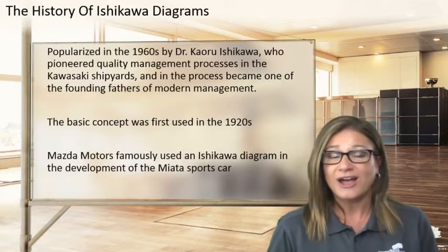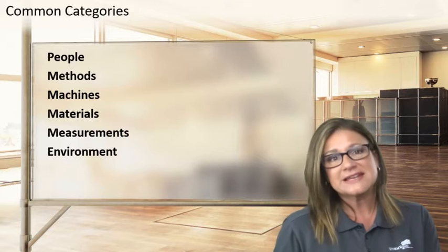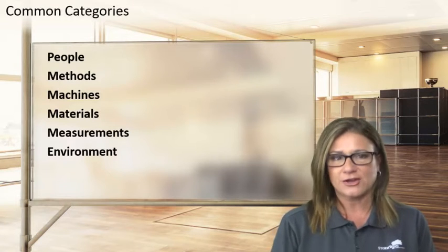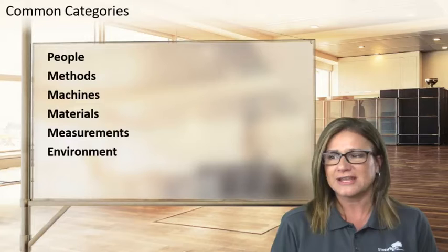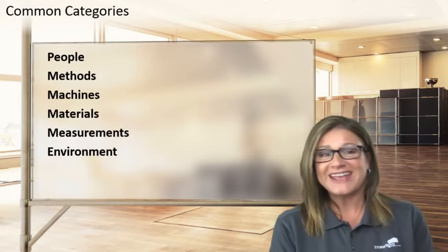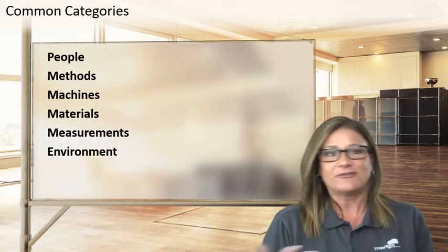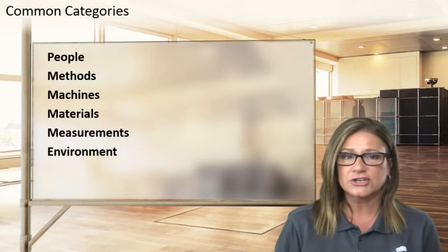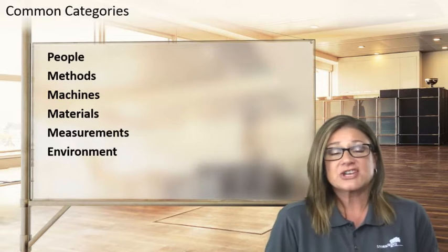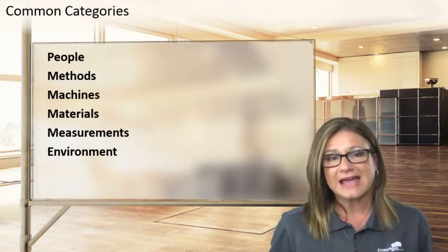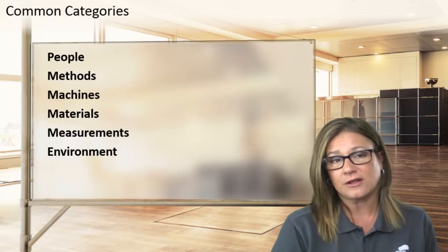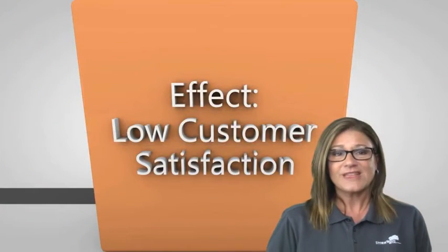Let's look at common categories of breakdown so you can compartmentalize and start looking for root causes. These are the most common, but they're not the end-all-be-all — they can vary by industry. Categories include: people creating defects or contributing to risk, the methods being used, machinery, materials, how we measure performance, and the environment. You can use any big categories that fit your industry to narrow down why a risk event could occur or a quality problem has occurred.